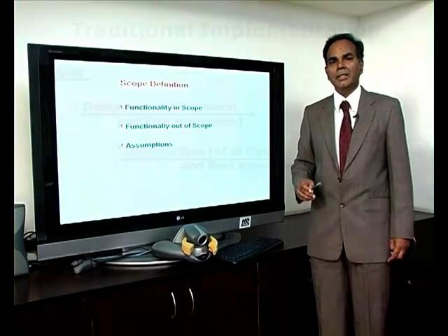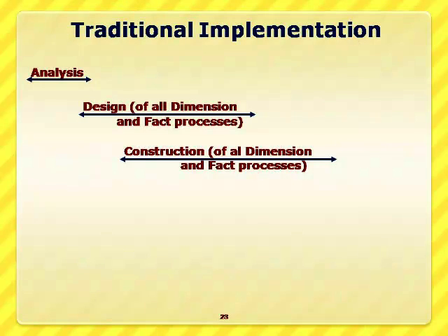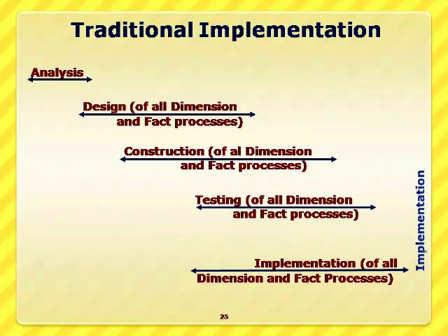Now let us go to the next step of implementation. For data warehouse implementation, generally people go by a traditional model. What do we do in this traditional implementation? We do the analysis, design the data warehouse for all dimensions and all fact processes, construct the data warehouse for all dimensions and all fact processes, test for all dimensions and fact processes, and implement for all dimensions and fact processes.